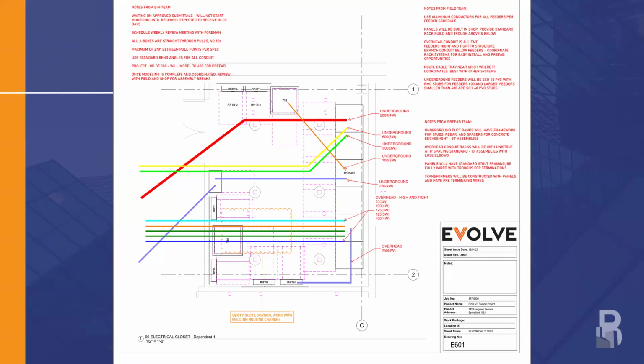And that's kind of the last final check on my list to ensure that, hey, I've done all the steps, all the things that I know to do, that I'm privy to. I've consolidated all the information that I have and applied it to this drawing. The next step for me is to go get my buy-in from my project manager or my superintendent, or somebody that can go in and just give an extra pair of eyes to this situation.